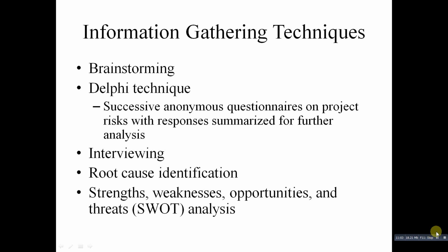The Delphi technique uses repeated rounds of questioning and written responses, including feedback to responses in earlier rounds, to take advantage of group input while avoiding the possible biasing effects of oral panel deliberations. To use the Delphi technique, you must select a panel of experts for the particular area in question.